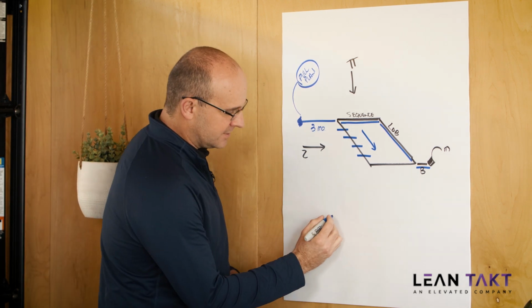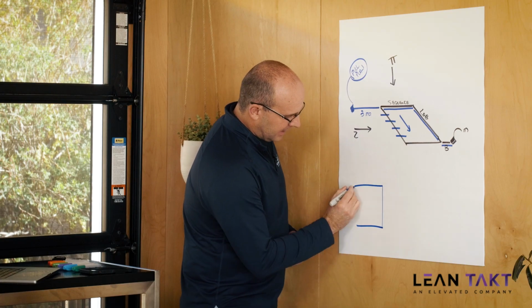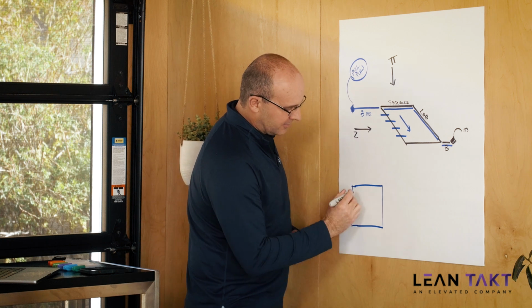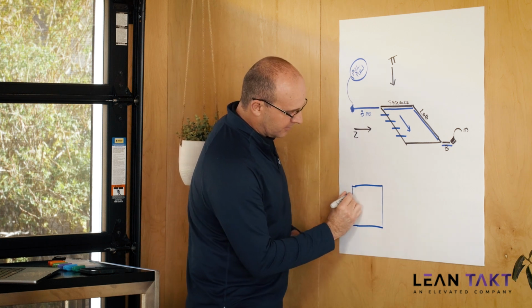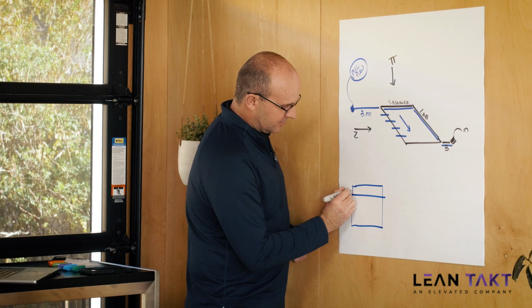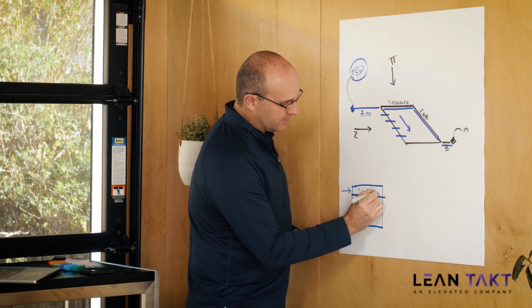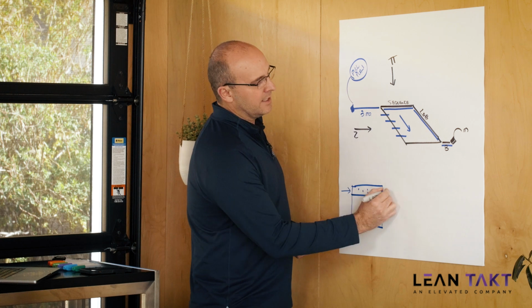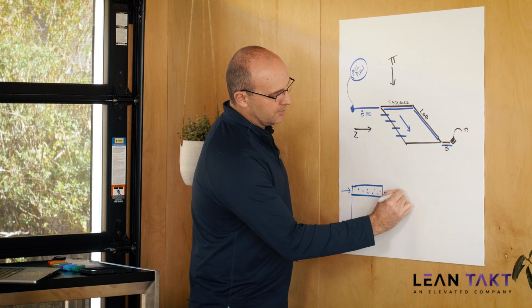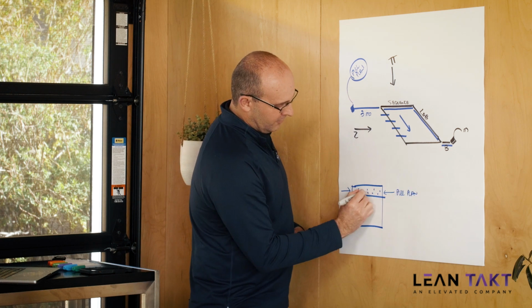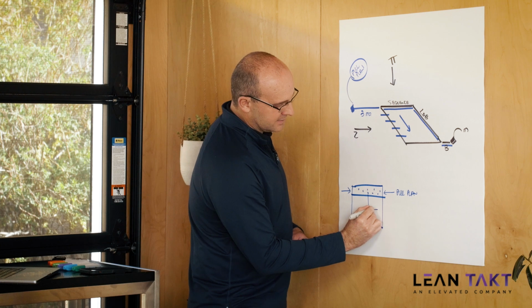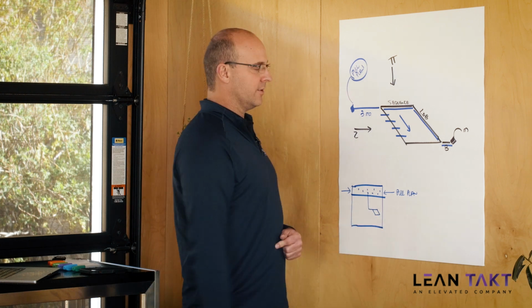Whenever you see tact plans, typically on the macro, you should have this little section on the top that shows the different pull plan milestones, so that you're automatically triggered to do the pull plan at the right time for a phase that might be out ahead of you on the project.